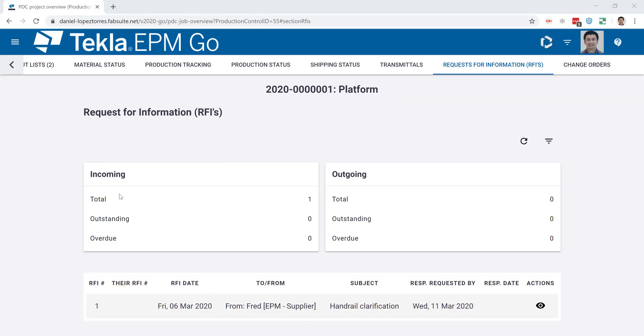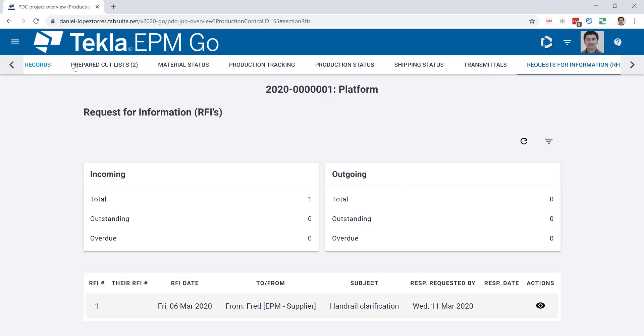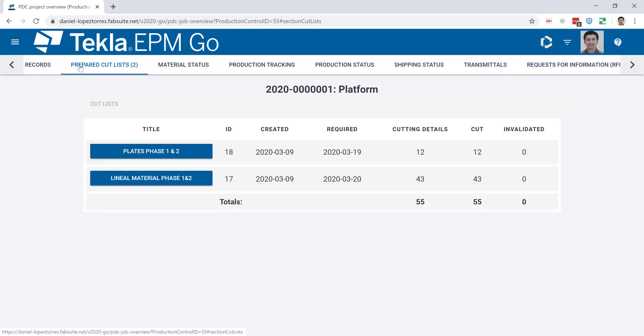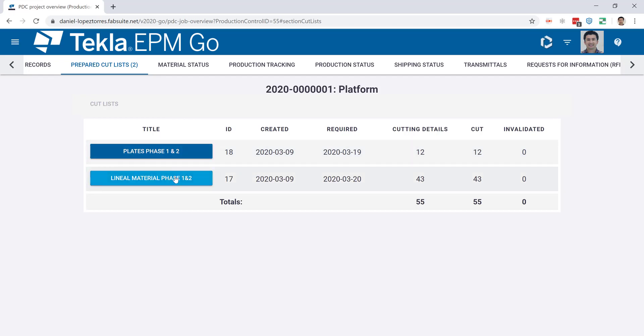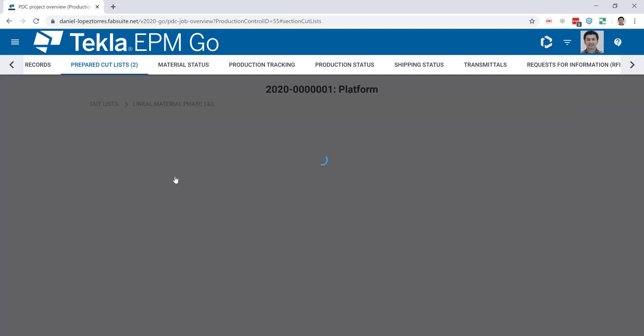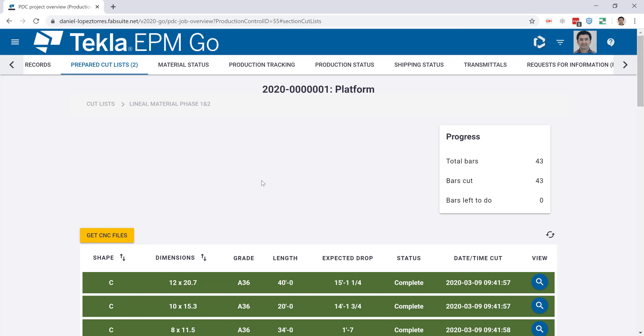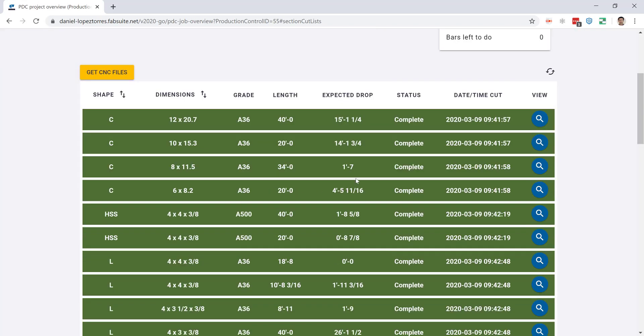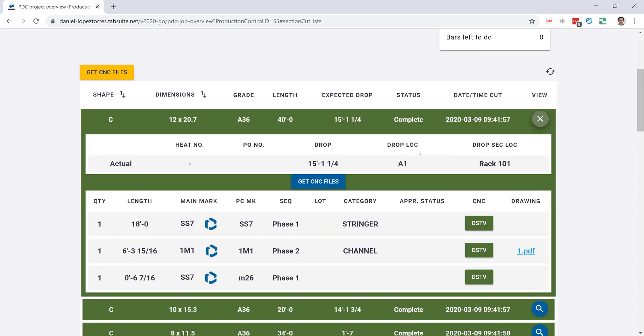Then we have electronic cut list, which is one of the most liked features of EPM Go. That is because a saw or plasma operator could be at their control station and even using the machine computer they have or proper equipment if the internet is available, and see the current structures from there and get a pick list, get an NC1 file, or just simply update the inventory and the production tracking at the same time. So this is very helpful for real-time data information.